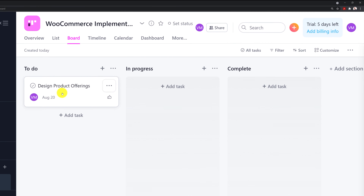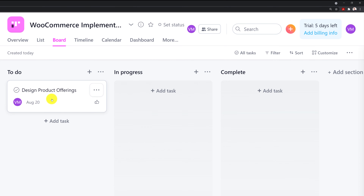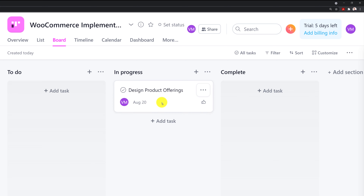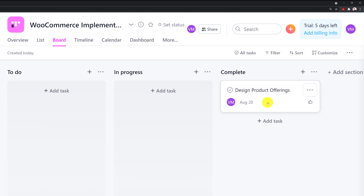Now we have the first task. We have this task in the to-do column, which means I haven't started working on it yet. As soon as I start, I can drag it into in-progress — that's the indicator for other people, or even for myself, that I'm currently working on this task. Once I'm done, I can just drag it to the complete section. That's ultimately what's called a lifecycle for the task in my project.